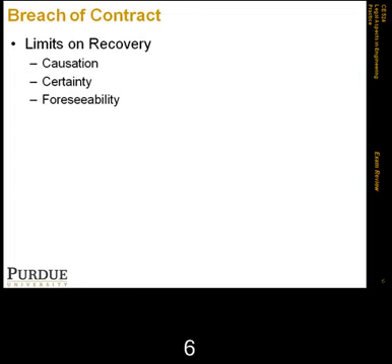And we had an example of a case, again, case history, where a certain delay was not foreseeable to cause that much damage. And also the fact that there was huge disparity between the value of the contract and the amount of the loss. So it definitely shows that foreseeability is important. Another important limit is something called avoidable consequences, which is that a claimant cannot recover damages that they could have reasonably avoided.